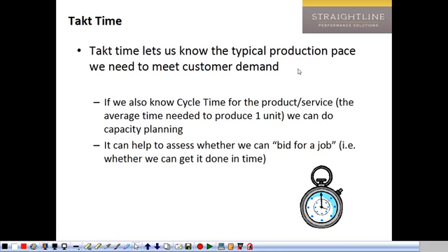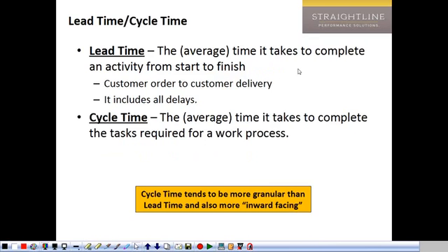If you're managing the IT system design change process, for example, if we need to do 20 in a quarter, that means we need to do 20 divided by 3 per month, right? So that's what, 6.5 or 6 1/3, and that means that every week we're going to be doing essentially 1.5. So if a few weeks have gone by and we haven't had any releases, we know we're a bit in trouble.